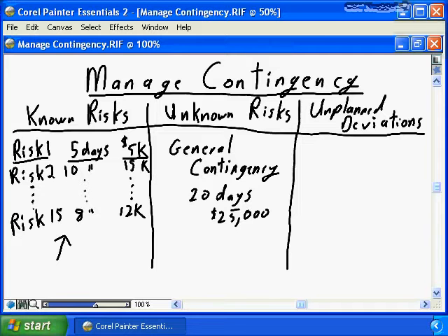It's very tempting in week 1 of the project or month 1 of the project to say, I have a deviation. I have bad estimates. I've lost 5 days. I've lost, coincidentally, $5,000 in project delivery funds. I'm going to simply start to consume my contingency as a result of bad estimates. Absolutely the wrong strategy to apply.